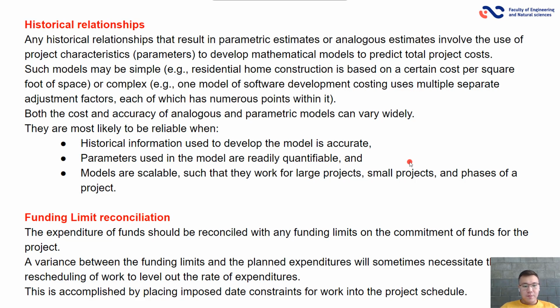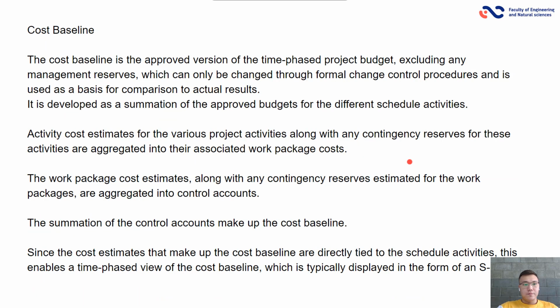A variance between the funding limits and planned expenditures will sometimes necessitate the rescheduling of work to level out the rate of expenditures. This is accomplished by placing imposed date constraints for work into the project schedule.